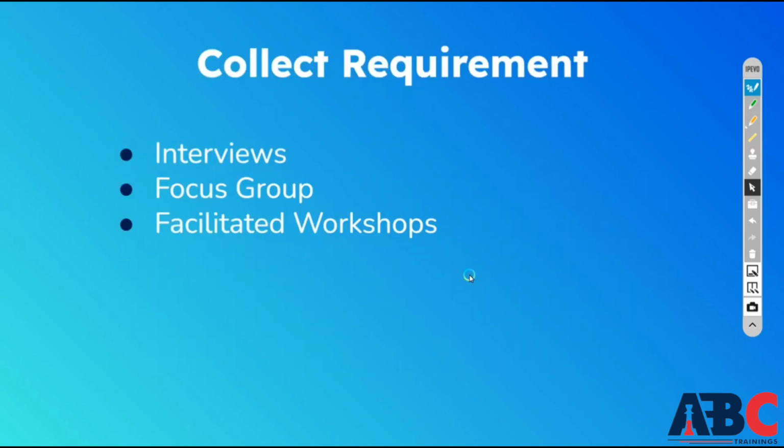For this, the second step is collect requirements. Within collect requirements, you arrange meetings with your clients and ask them what their requirements are, schedule or budget, or whether there will be any specific constraints within which they have to complete the project. Whether we have to finish the project, the duration of the project, how much time we need, and what the budget is. The client's requirement, what do they want? If you collect all those requirements, that happens in collect requirements.